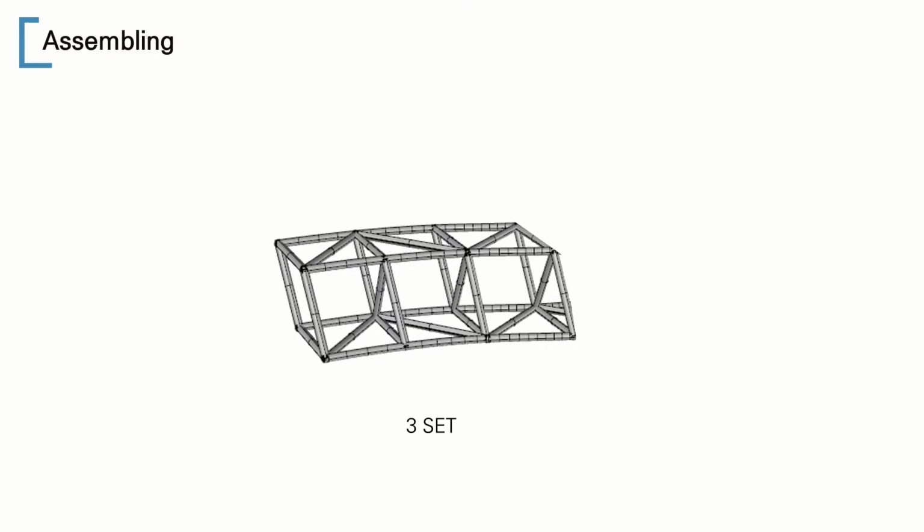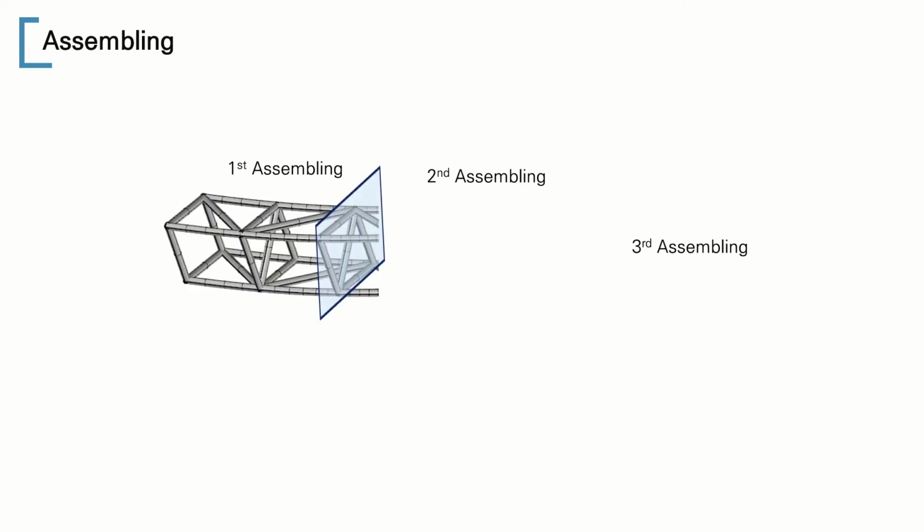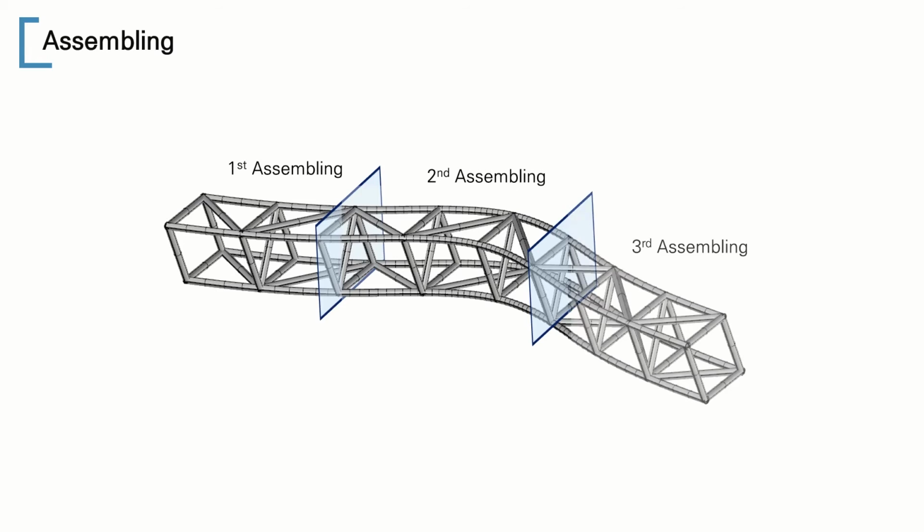It starts from the first floor to the ninth floor above ground. This completes installation number 1. Number 2, secure the load to the PRD column. Use a temporary material with a 60 mm iron wire. Number 3, installation of steel frames from the second floor to the fourth floor. Number 5, install the next floor using the crane and wire fixation. When the steel set is completed, it shows this kind of steel frame.